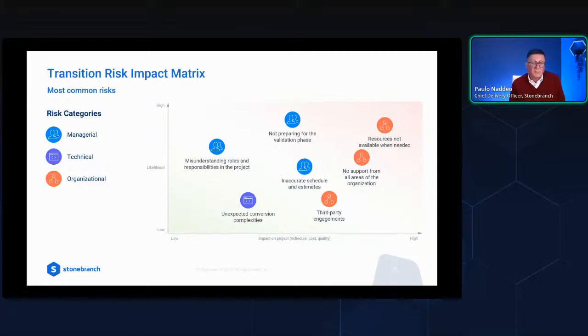And the team that is working on your workload transition is going to be waiting until they are done with their changes. So it is very important to identify the third-party dependencies very early on in the project when we are doing planning. And while we are doing planning, we can anticipate and negotiate those things.